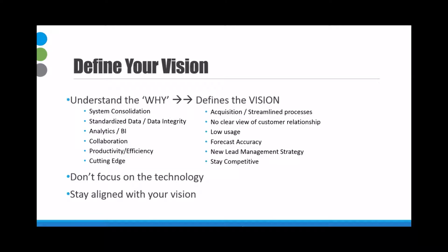Be sure that you have a clear understanding of why you're going to implement the CRM system and what you hope to gain from it, so your vision. How you get there, that's something that will kind of present itself and evolve as we move through the next steps. But you also need to set this vision up front, because as you progress through the project, it's very easy to get off task, to kind of lose your way a little bit and get off on tangents. But if you can have this vision clearly defined up front, you can easily get realigned and get back on track. But without the vision, you can kind of get lost.